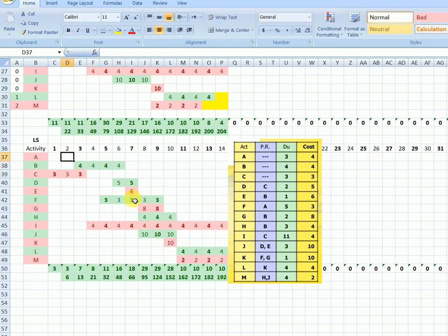A depends on F. F is here, should be here. How much? 4. Does not matter. A is not a critical activity. Okay.